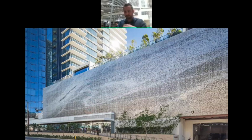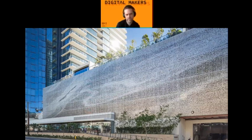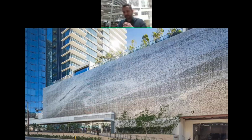But at which part of the design stage do you come in? So for design assist contracts, we might be involved usually after schematic design, but before construction documents are complete. Sometimes we'll be involved earlier, maybe at 50% construction documents, when the program for the building is in a lot of cases somewhat established. In the case of what's on the screen now, it's a parking garage. It has a certain program. It has to have this many cars. There are some things established about the ventilation. That's where the perforations come into play, obviously, since allowing ventilation is required.